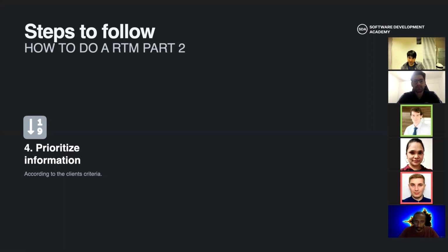But in the group project, one group literally spent the first sprint in Agile. We will not go into details of what the group project is about. But in any case, they spent the first sprint making a login system. And I swear that when they showcased the sprint demo, they showcased the login, and then they literally went to a white page, a black and white web page with black letters saying home screen. That's it. And I told them, do you think that this brings value?